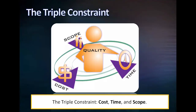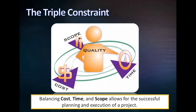In another scenario, if a client requests to shorten the duration of a project, you would need more resources to execute the same scope. Therefore, there is a balancing of these three elements that, only when fully understood by the project manager, allows for the successful planning and execution of a project.